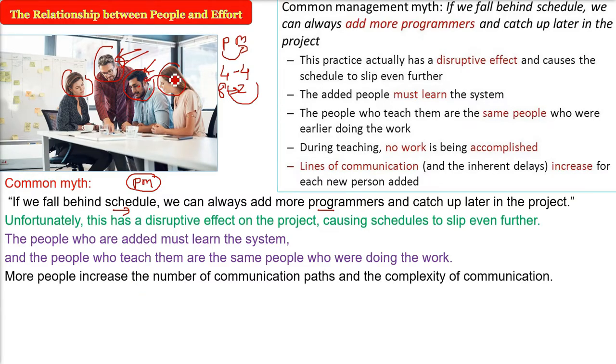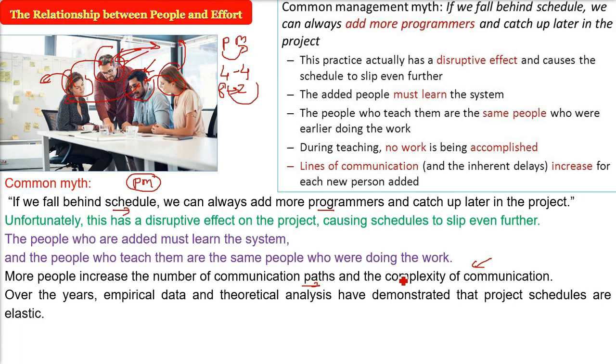And more people means more communication. The number of paths will increase. The complexity of communication will increase, and that will slip your schedules even more. So these are some inherent factors which are to be considered. Over the years, different data, whether empirical data or theoretical analysis, has demonstrated that project schedules are quite elastic. They are elastic.